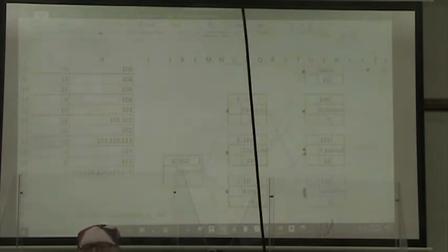All right, of course, for all of these, our early finish time is equal to our early start time plus our duration. Okay, so I'm going to go ahead and put the code in for those.